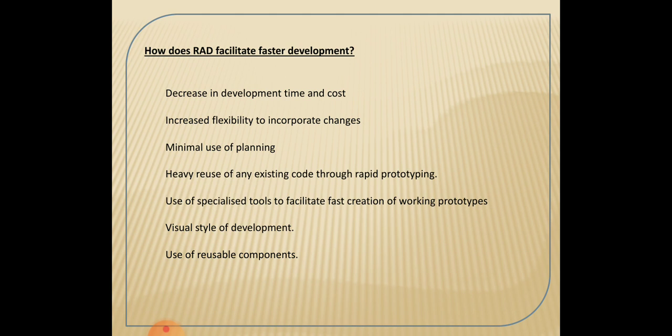The customers usually suggest a change to a specific feature only after they have used it. As we said earlier, they have to go through the partially developed software so that they can provide feedback. Since the features are delivered in small increments, the customers are able to give their change requests based on the already delivered software. So, incorporating such a change request just after the delivery of an incremental feature saves cost, time, the maintenance effort, and the need for testing.